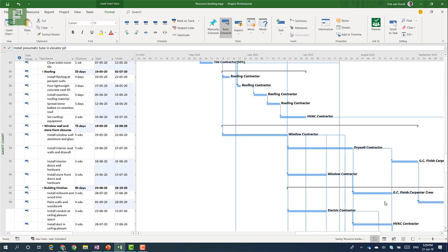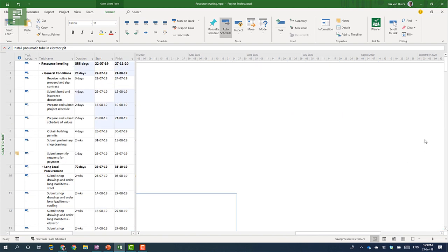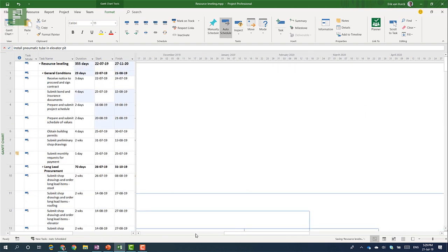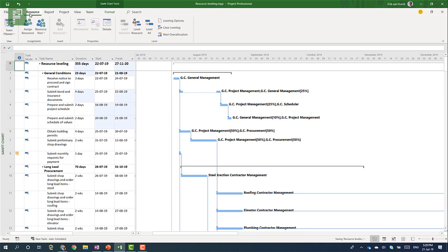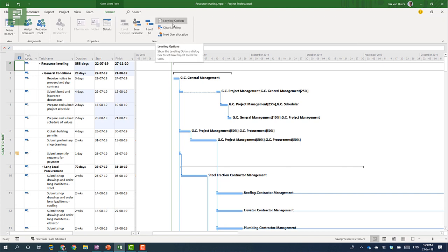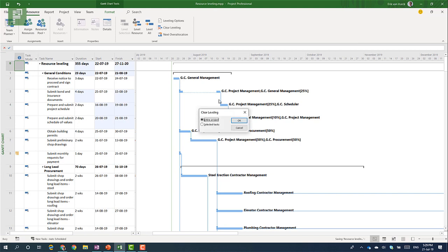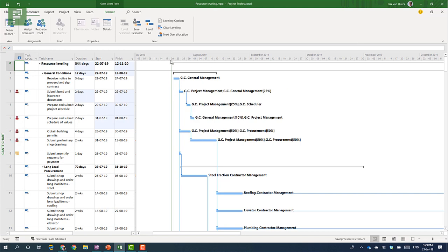But is this the best scheduling or over allocation solver at the moment? I believe it isn't. And that's where the leveling options comes into play. Where you for instance can set that the split option isn't an actual option for Microsoft Project to take into account. But let's click on clear leveling for now. And let's have a look at the last button for now. Which is called the next over allocation.